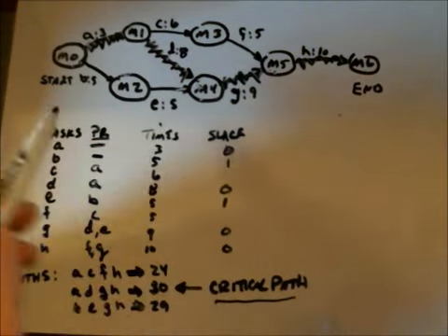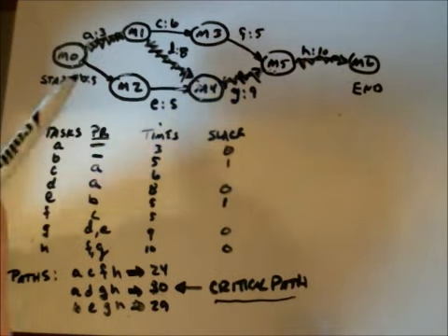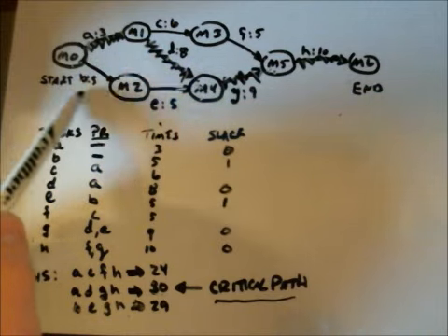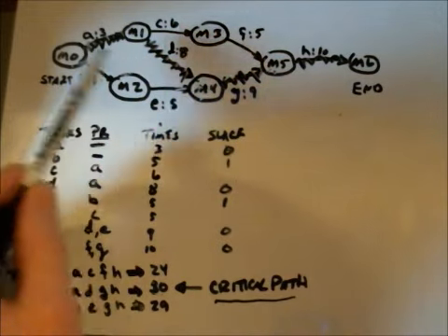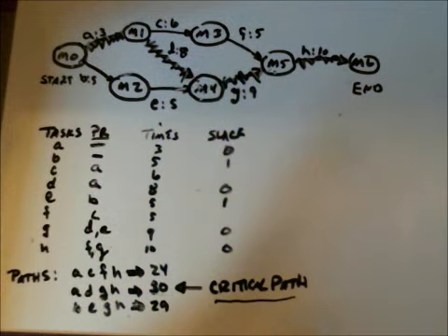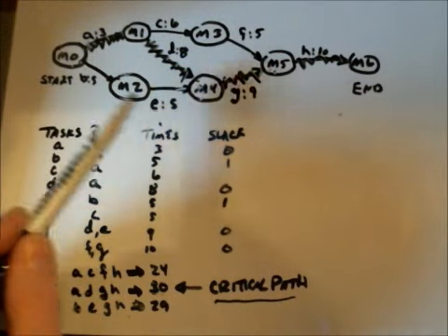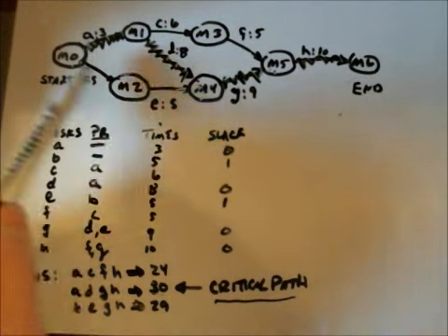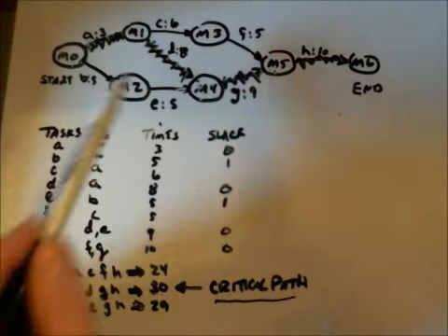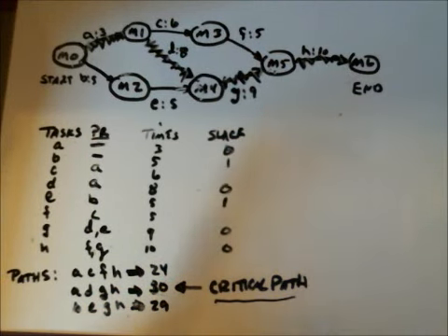Right? You couldn't use 1 extra unit of time for both of them, but theoretically, I could take 6 units here, and 5 would put me here at 11 units, which is equal to the length along the critical path. Or no extra time there and 1 extra unit there, and that would give me a total of 11 as well. All right, you could split it half and half, etc.